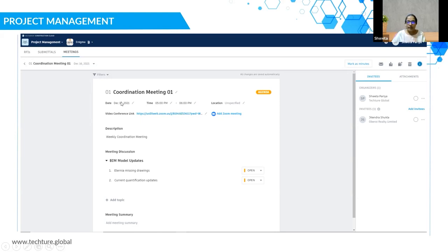All right. So rather than documenting MOMs in your Word document or in your Excel, you can create a meeting here first. Once the meeting is completed, you can change it into an MOM. You can describe everything that was discussed in the meeting, mark the minutes, the tab that you see here, and save. So if you have weekly meetings, weekly design coordination meetings, you can schedule all of them, save all of them on BIM360 in the project management tab, and then you can even minute the meetings then and there.